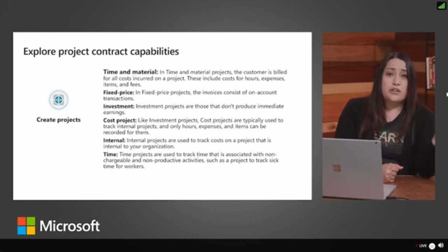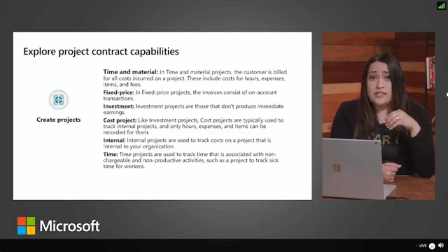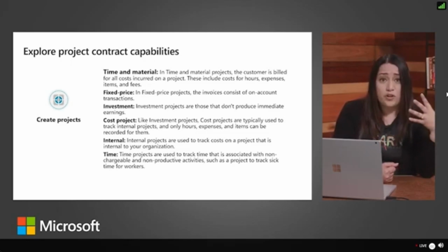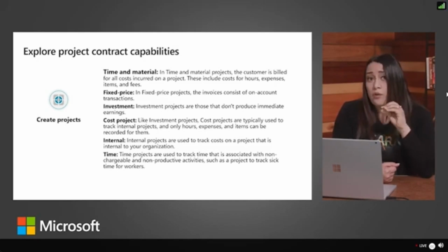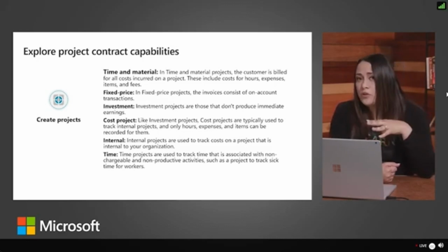But they're not necessarily working on a billable project. So since their utilization needs to be tracked, we can use this if we need to pull resources for another project. When employees are booking time to this non-billable project, they're going to appear as utilized, so you don't have to worry about overbooking them for other projects.